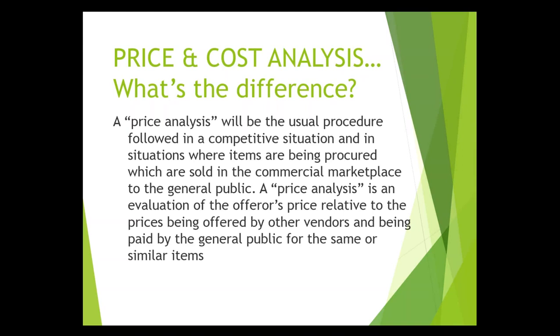the price analysis and evaluation of the offer's price relative to the prices being offered by other vendors. Really, it's typically you taking the quotations and looking at them. These are what the general public would pay for the same or similar items, and just really comparing the prices. So it's not necessary that the competing products be exactly identical to the product being offered, but you must be able to compare the product's capabilities and their respective price differences in light of varying capabilities. Again, when we get into this, these are things that we would ask that you contact Office of Transit staff to help you out with.